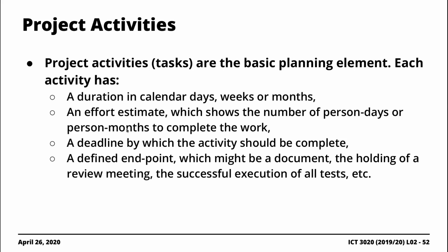Tasks and activities are associated with durations and calendar dates, right? Start times, end times, duration. And it's usually the case that you'd break down these activities, insofar as the schedule is concerned, down to, let's say, a unit of time such as a week. A week is usually good, right? In certain instances, you might want to break them up based on, let's say, bi-weekly units.